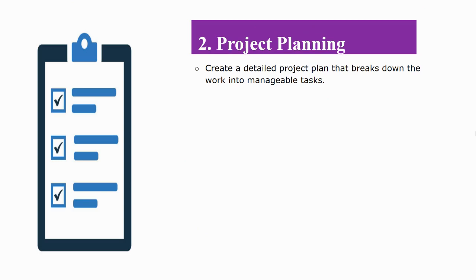Remember, from the initiation phase, we have a clear understanding of what we need to do to carry on this project. During the planning phase, we go into more detail to outline the different tasks that we have. Here, we break down the tasks into manageable work that we are going to carry out. For instance, constructing a hand pump in the community. That is huge work. Of course, we need to break down the task of constructing the hand pump. For constructing a hand pump, you might need to conduct surveys. You might need to go there, get the site, do assessment, and several other things.